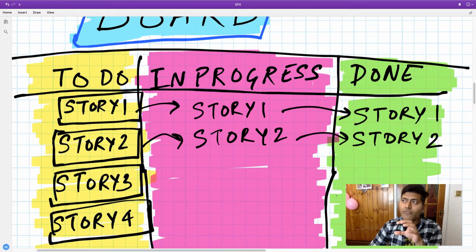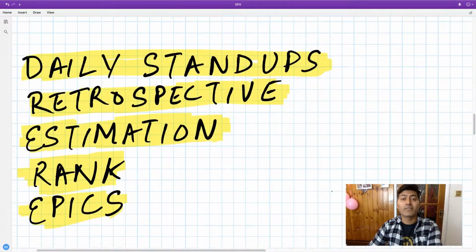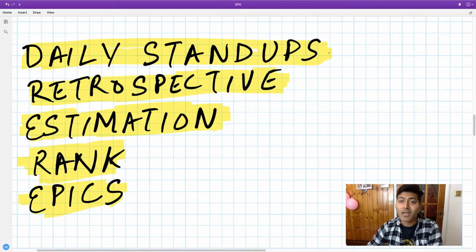The whole idea of Agile is that if something is about to go wrong, you should fix it early in your sprint. That is why there is a concept of daily stand-ups, where you ask team members what you did yesterday, what you are going to do today, and whether something is blocking you. You take appropriate measures regularly and early, so that you don't end up with just 2 days left and still have not finished your work.